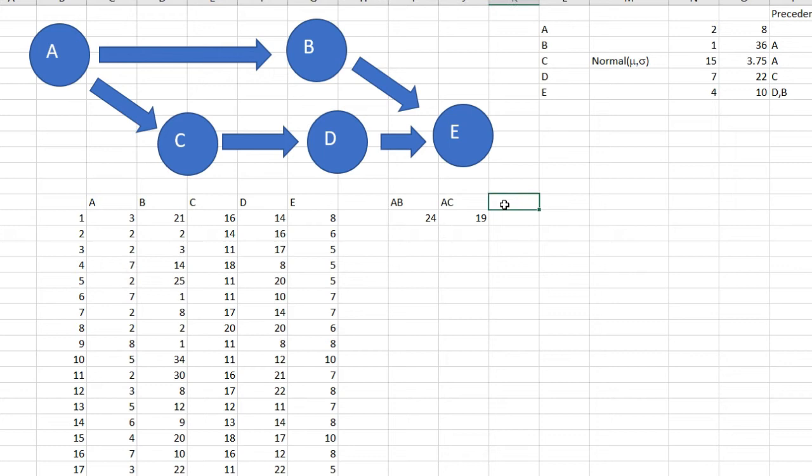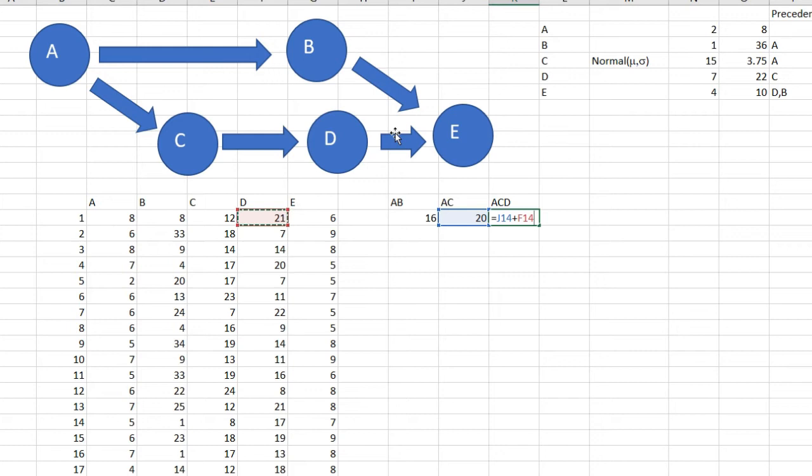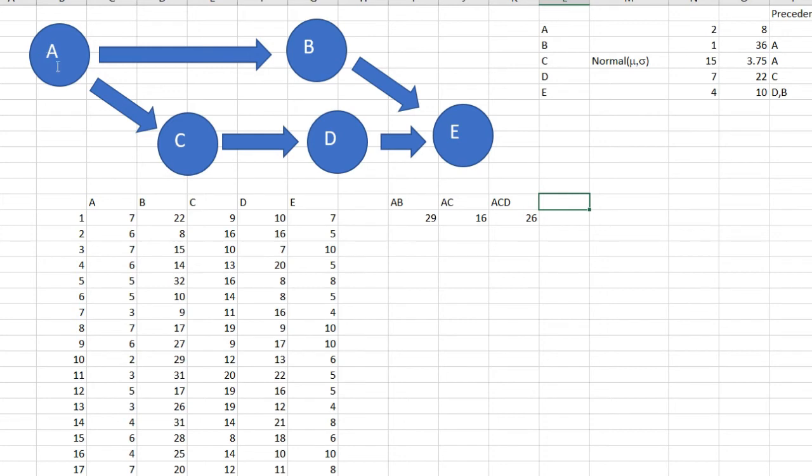And then I have ACD. I cannot do ABE now—I just need to finish ACD first. And it's equal to AC plus D. You can also add A and C and D, it's the same thing.